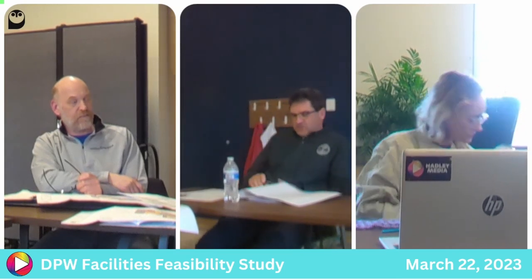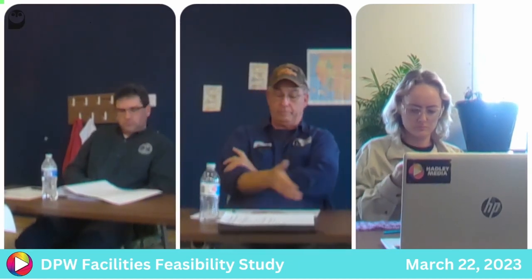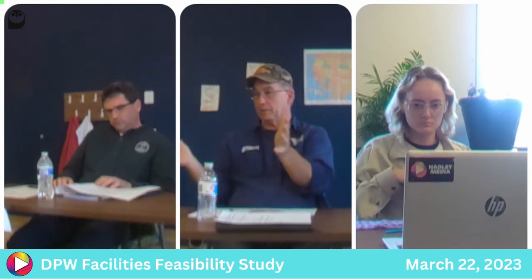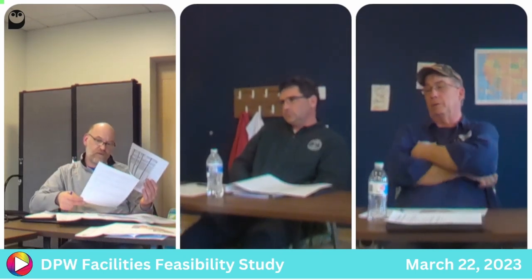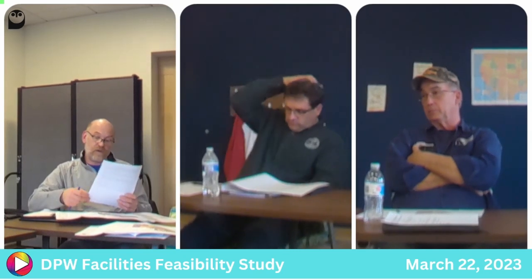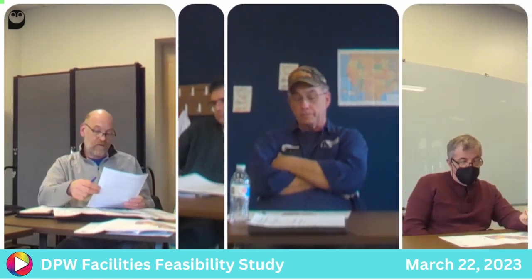And like I said, this all comes down to the people of Hadley, what they want. However soon we vote on this, it's going to be at least 2 years before it gets going. That number does include a little bit of inflation. It does include escalation for 2 years, so that's out to 2025. It also does include about $1.5 million of renovation work on the existing building, assuming we do something to it.